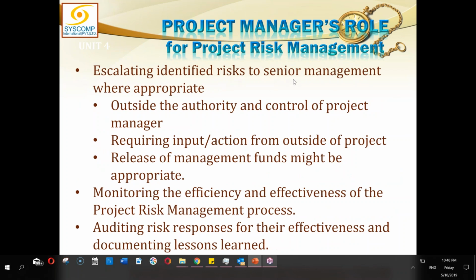Escalating identified risks to senior management where appropriate. That is, outside the authority and control of the project manager, requiring input or action from outside of the project, or release of management funds might be appropriate. So these are some of the conditions where senior management has to get involved. We have to escalate the issue to senior management when things are not in control of the project manager and he needs to seek guidance, help or funding from outside.